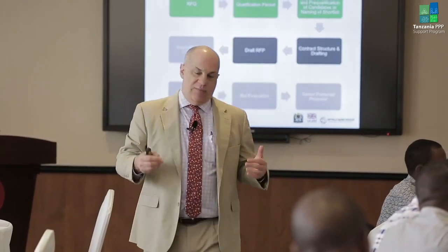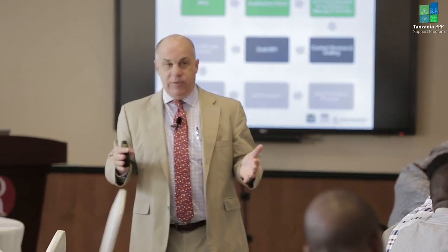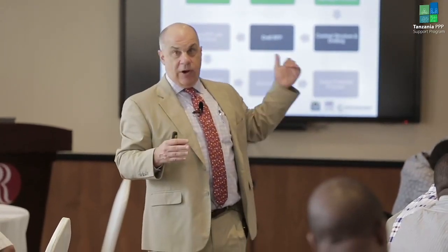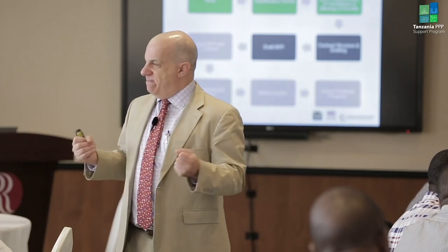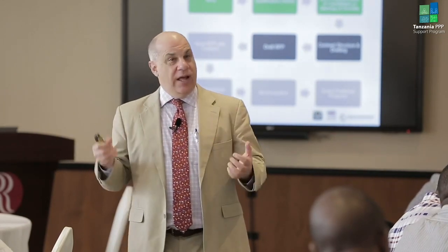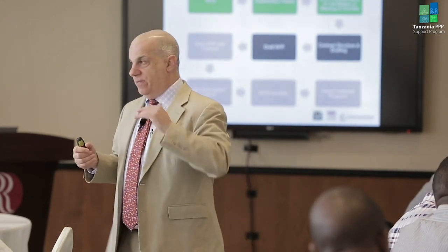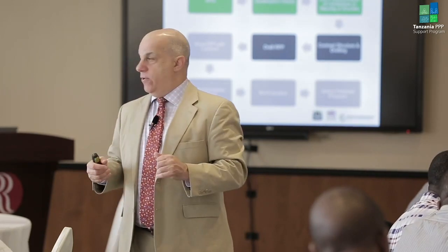And the short list, if we receive a large response to the RFQ, that short list might be only 3 or 4 firms. And I said the 12 firms that responded were generally qualified, nothing terribly negative. Well, that's where your work comes in. You have to do a lot of work to get it down to maybe 3 or 4 firms.